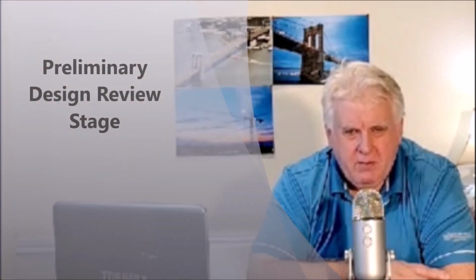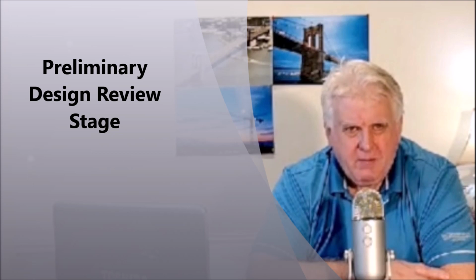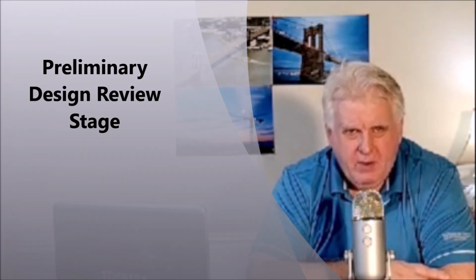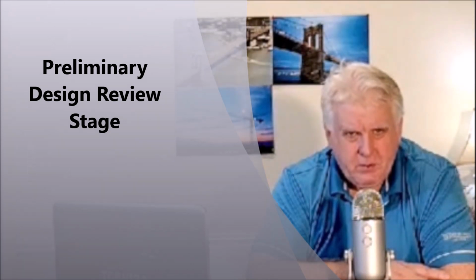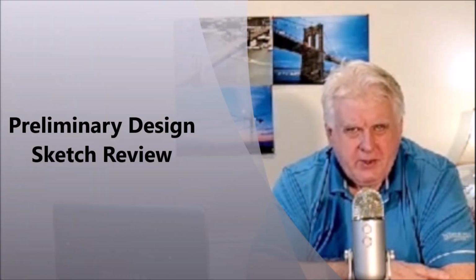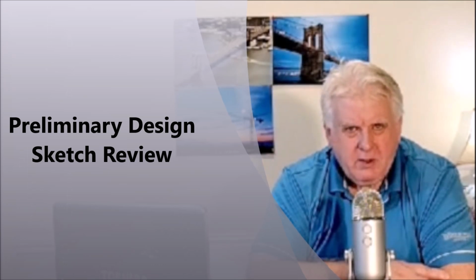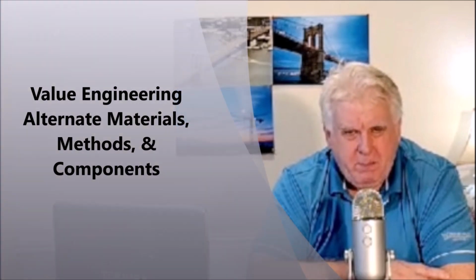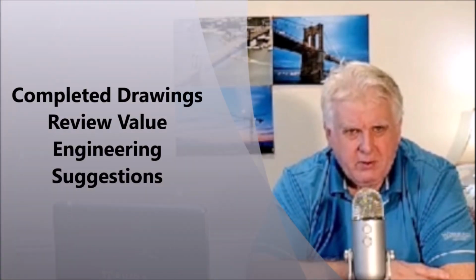Now, you can use value engineering at the preliminary design review with your architect or engineer. You can come up with some value engineering items at that time from your architect, engineer, or your value engineers, or your construction manager or contractor. You can also do it at the preliminary design sketch review time and start coming up with ideas to look at different materials, methods, and components that may help you save costs on your project. And you can also do it at the final stage of construction drawings.